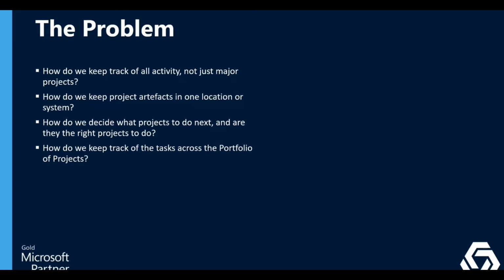And some of our customers, like Boots and Taylors, will use all their strategic actions and objectives, and there's like 48 of them across BTG at the moment, all in the Project Online project management system, and every project is tagged to each of those strategic actions or approaches, I think they call them, and then given a numerical score. The more strategic objectives you meet, the higher the score of the project is, and even the requests that come in are assessed against that in a formulaic way, and therefore it tells them what projects they should do next, what brand to invest in, what office to open, or what factory to reconfigure, etc., based on how it aligns to their strategic objectives.